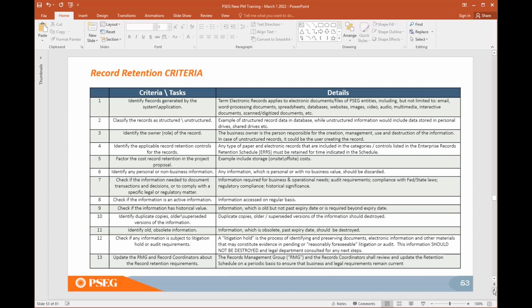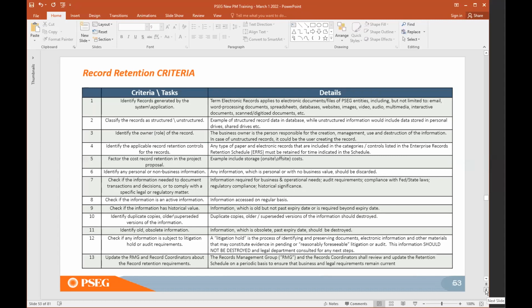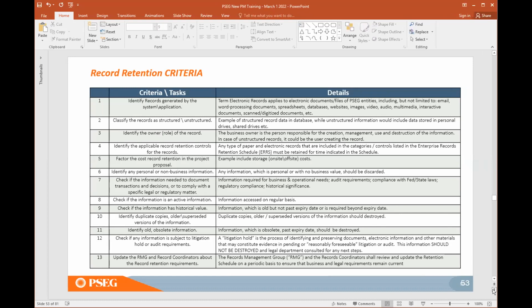Say, for example, you're storing on cloud, the gigabits of data you're storing have to be charged. So you have to inform them that it has to be built into your cost. You remember the non-workforce items that I was talking about in the cost estimator tool? That's where you will put this in as a line item. You can say that the record retention criteria requirement requires 5 gigabits or 100 gigabits of data to be stored, by the end of every quarter, 4 times that. This is the cost, and that's how you calculate it.